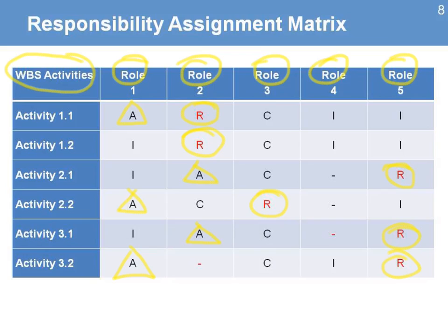The other roles in the matrix that can be assigned to other people are those who are going to be cooperating or contributing with some information or some work. So you can have other people with that role. And the other one is being informed. Whatever is happening in the activity, if that person is responsible for doing it, then they have to identify the people who need to be informed. That means that they're going to be getting some reports or information about the progress on the activity.